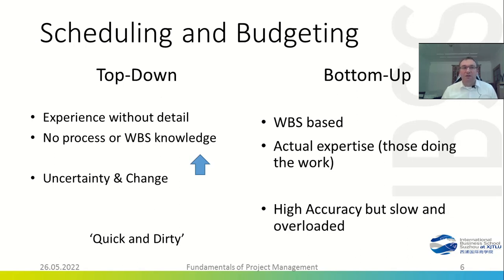This is called the fudge factor. Especially when you know that an idea that will cost 100 currency units and take 100 days will immediately have 20% of the budget and 20% of the time cut by superiors, you price that in and say, well, it will cost 130 days and 130 currency units.